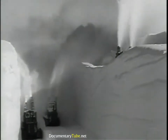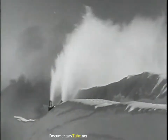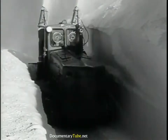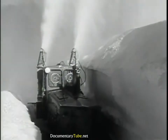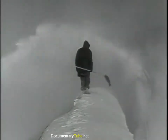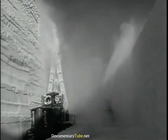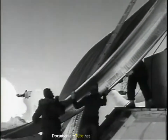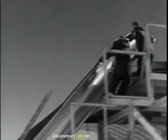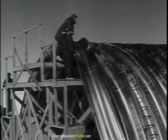On this cut, we used 3 plows simultaneously, 2 plows throwing up snow from below, the third cutting a spoil trench up above to prevent loose snow from sliding back into the cut. To avoid melting caused by the sun, much of this work was done at night. These scenes were filmed at 2 a.m. Until the trench was covered, there was always a threat that the 40-foot arches would collapse, a shoulder already weakened by the 24-hour-a-day Arctic sunlight.